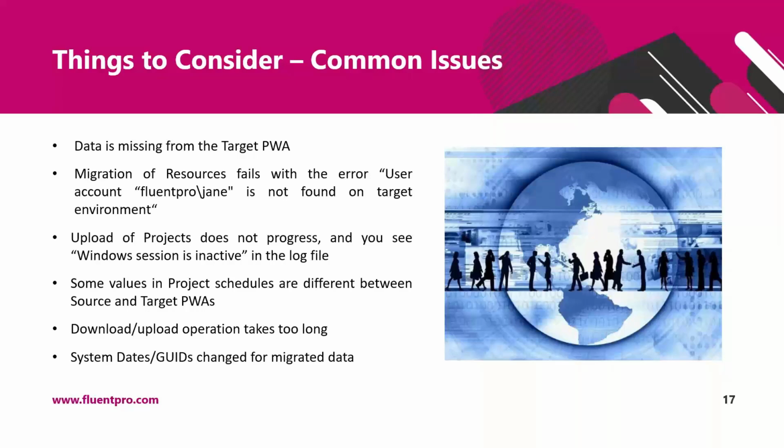So to avoid this issue, first of all, the user account should be created on the target tenant level. Account mapping should be created, and this account mapping should be provided to FluentBooks during upload operations.